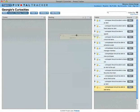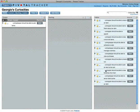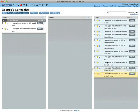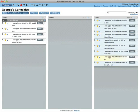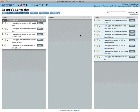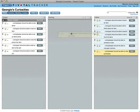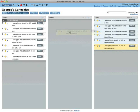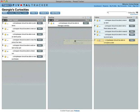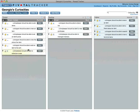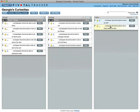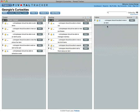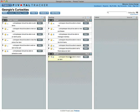Prioritize your work in the backlog. The principal way to do this is to actually drag the stories into position, like so. Drop them on this striped area or sandwich between two others. The higher up a story is, the sooner it will be addressed.